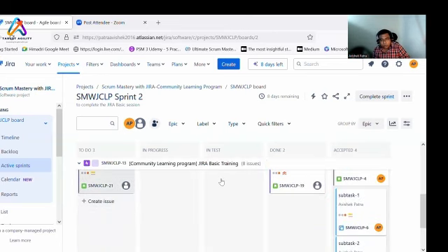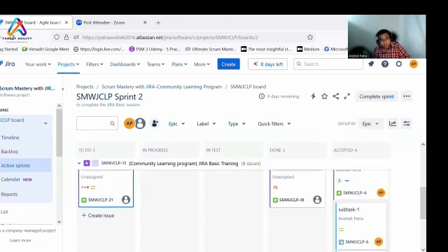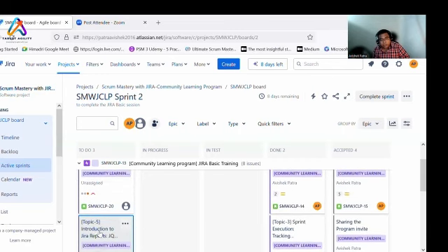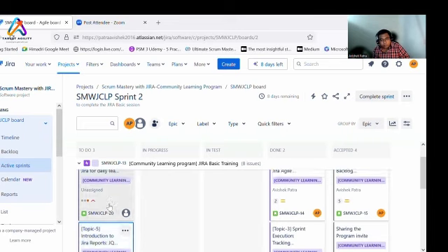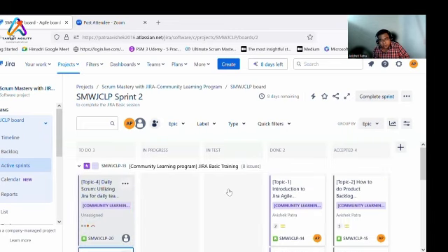Okay, one more. This activity is what we need to do throughout the sprint so that our burn down chart is healthy and doesn't show a steep completion on the last day of the sprint. That is, we are going for the review.